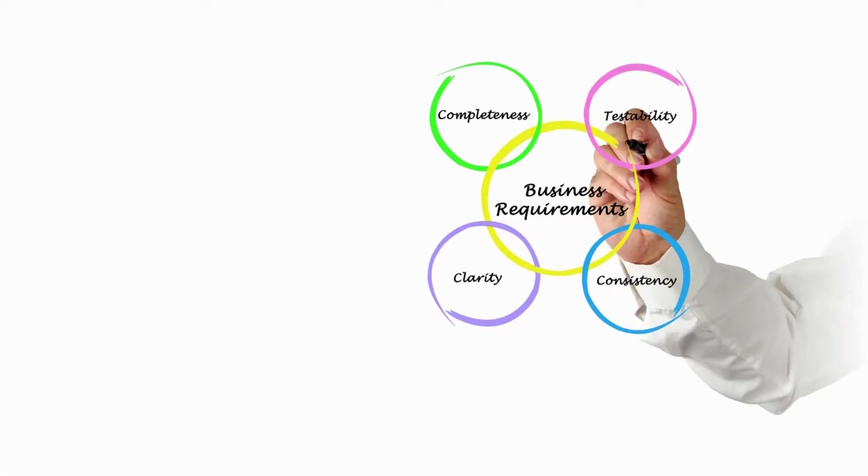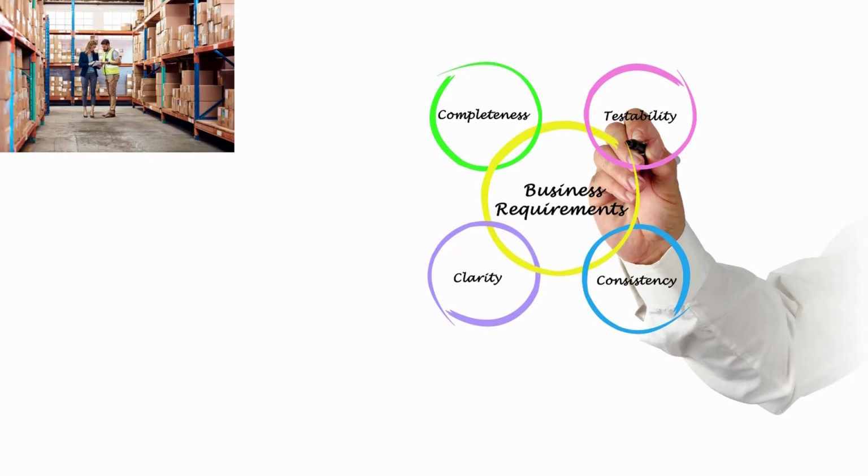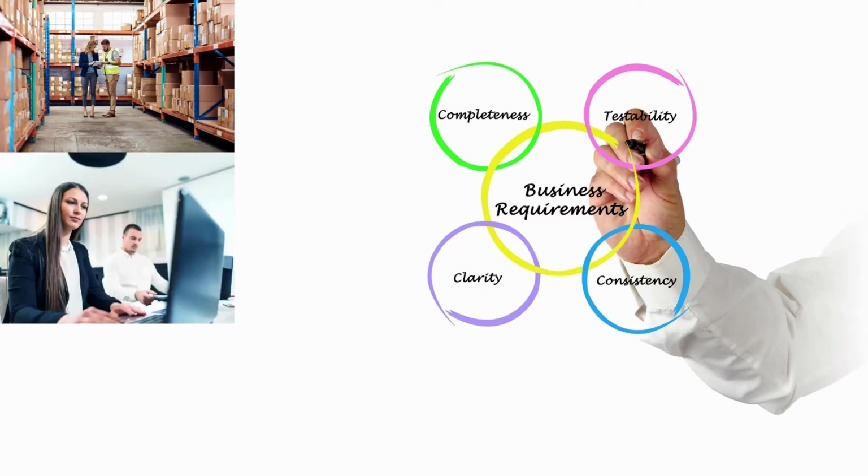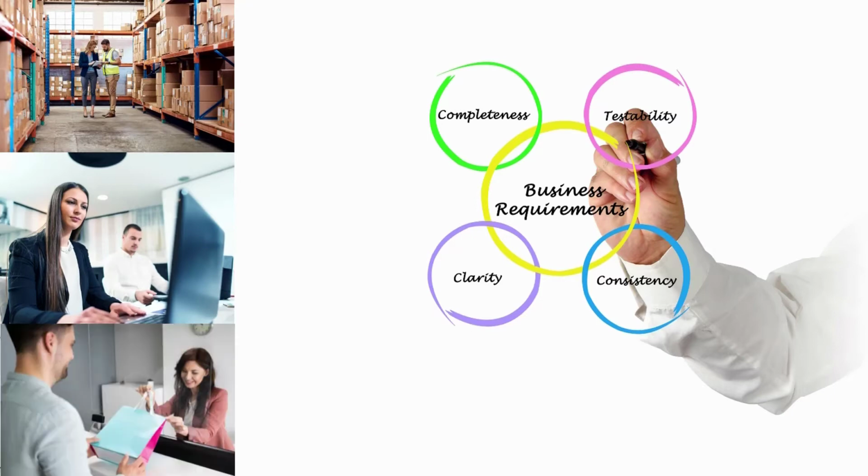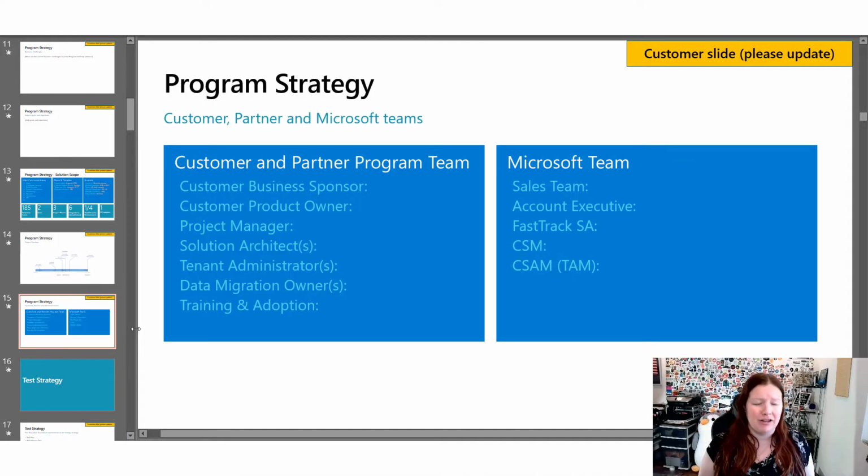We always recommend that your business requirements are sourced directly from the business users, and those business users should write their own test scripts, and they should play an active role in the development of your standard operating procedures and training materials.